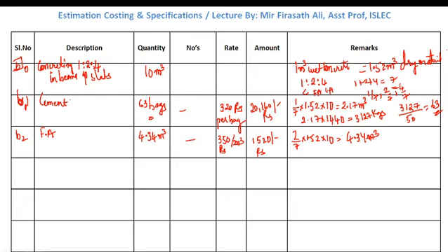Now next, coarse aggregate. Now we have coarse aggregate also. So in coarse aggregate, what is the value? 4/7 into 1.52 into 10 is equal to, what will be the value? 8.68 meter cube. So this is nothing but our quantity, 8.68 meter cube.